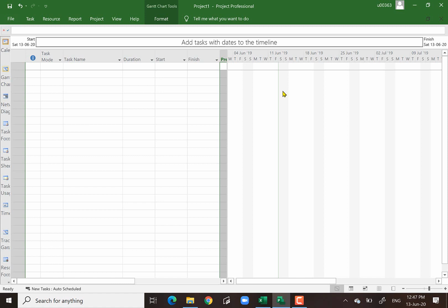That's why we need to do some changes. And another thing is that you notice there is a dotted line here. So today is 13 June. So what the computer is showing is today's date, whereas we say that we want to start the project on the 1st October, and the computer doesn't show the 1st October yet. That's why we need to do the setting.